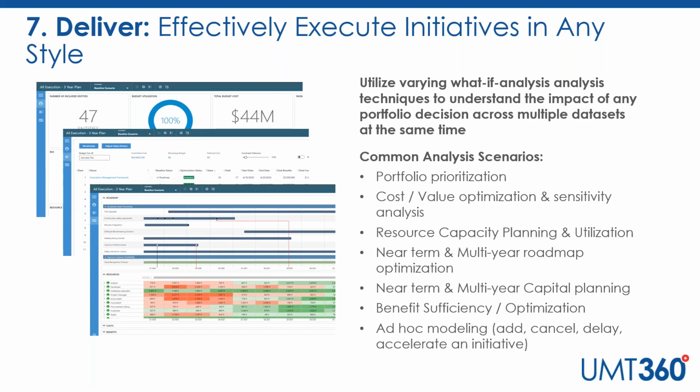What's the impact? So the value isn't necessarily the ability to master any particular analyses, resource capacity planning, multi-year fiscal planning, benefit optimization, or roadmap optimization. It is actually the ability to see the cause and effect of any change across multiple data sets at the same time. So if I did this, it impacts my resource availability this way. It's obviously pushing out my cost forecast. I'm actually accelerating my benefit realization time frame, and I'm adversely impacting the date needed by an application or capability because everything is connected.